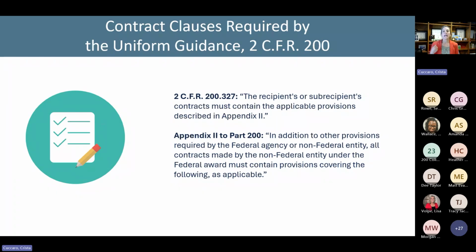The uniform guidance goes on to tell us that there are specific contract clauses that need to be included. We find this in 2 different places in the uniform guidance, where one references the other. The first place that we find it is 2 CFR 200.327, and it says the recipient or subrecipient's contracts must contain the applicable provisions described in Appendix 2. So then we have to hop on over to Appendix 2, and Appendix 2 says, in addition to other provisions required by the federal agency or non-federal entity, all contracts made by the non-federal entity under the federal award must contain provisions covering the following as applicable, ...